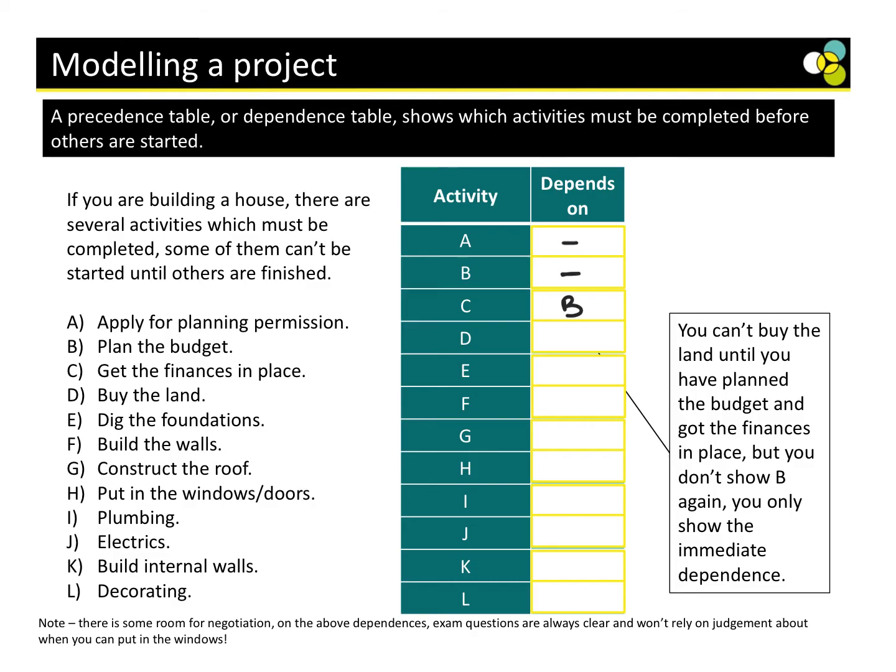Okay? Then, next up, we have buying the land. Now, buying the land depends on getting the finances in place. When we look at what it depends on, we look at what is the last thing that needs to happen for this to happen.